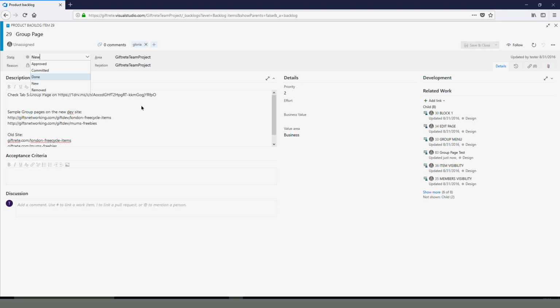Once a story is created for you, I'll tell you the flow. First, you create a new item. It goes to grooming session, it's been approved, and later it goes to committed. Under committed, that means it's in the sprint. That's where you start to write your test cases and everything.